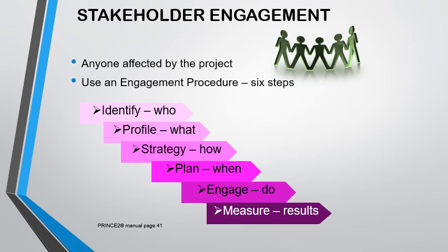First, we need to identify the people that are going to be stakeholders. Depending on the project, you need to know that the people in the environment are stakeholders where you're going to be handling the project. The agents that you're going to use to get resources, they are stakeholders. The vendors that are going to be supplying resources, they are stakeholders. The staff of the corporate company, they are stakeholders. The corporate company is also a stakeholder. Of course, you also need to know that regulatory bodies involved in the projects you're doing, or the sector where the project is being handled, they are also considered to be stakeholders.